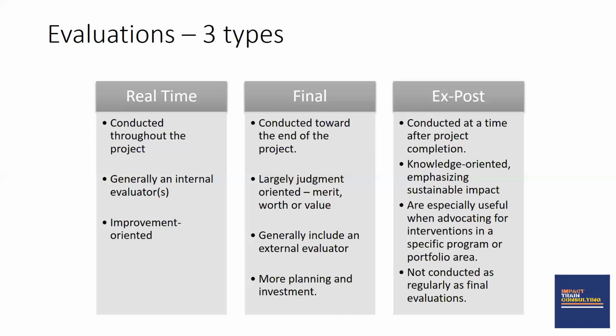Maybe 2-3 years after the project has ended, the donor can direct that you carry out an ex post evaluation. This evaluation is done to look at impact. It is trying to see if the impact that was generated by the project is still being maintained by the community members or the beneficiaries. And it is especially useful when advocating for interventions in a specific program or portfolio area. This evaluation is not conducted as regularly as the final evaluation.